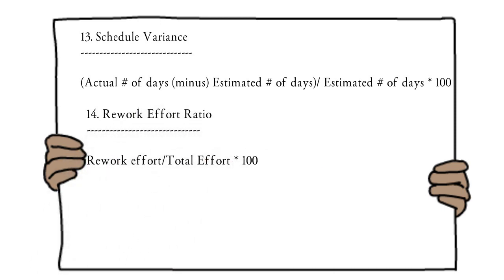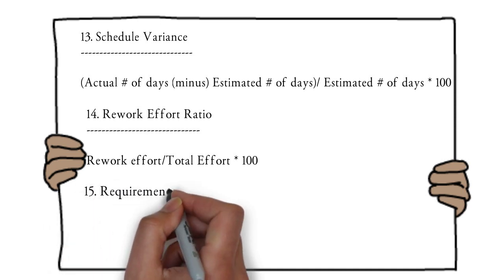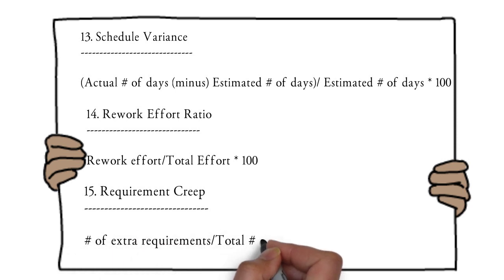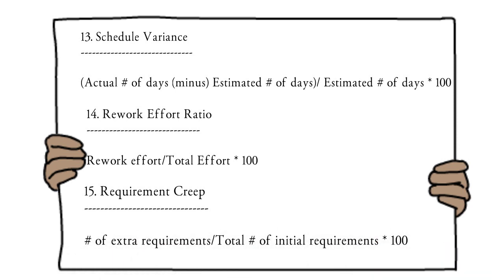Rework effort ratio accounts for rework due to changes in requirements. Rework effort ratio = (rework effort / total effort) × 100. The last metric is requirement creep — requirements may change while testing is in progress. Requirement creep percentage = (number of extra requirements / total number of initial requirements) × 100.